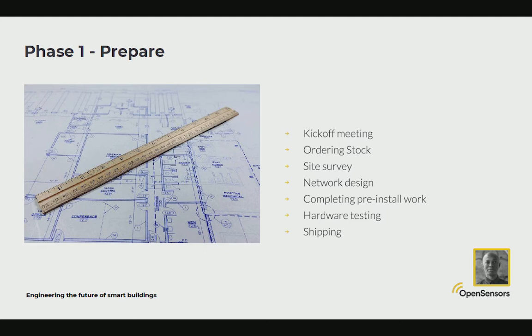So all of this, we spend time at the office staging the hardware and then delivering that. But typically this can turn around within a week to 2 weeks. So it's not a long-term process, but it allows us to lower the barrier and potential risks of proceeding to the next stage without being fully prepared to embark on deployment.